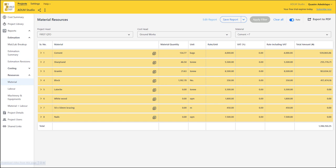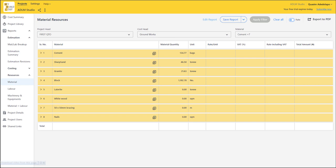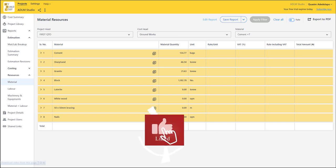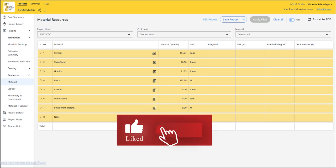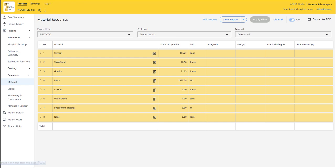It has considered your rates including VAT. Once I turn the rate off, I can just prepare this as my material breakdown and send to my subcontractor. If you have a store unit or a warehouse unit — which happens in Nigeria — just send this to the warehouse unit so you know what you are releasing for this particular work, what materials you are purchasing, what materials you are releasing for work, and you can track the usage.